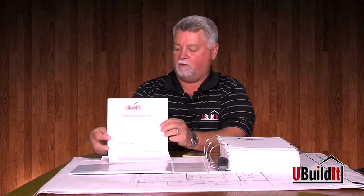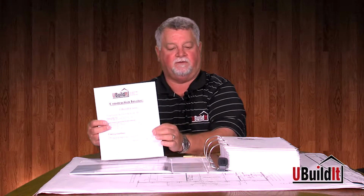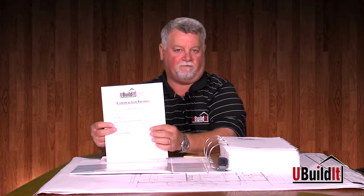At this time, we go over the construction invoice with the client. 50% is due when they receive the manual. 25% is due when they begin to start the frame, and the final 25% is due when they start drywall.